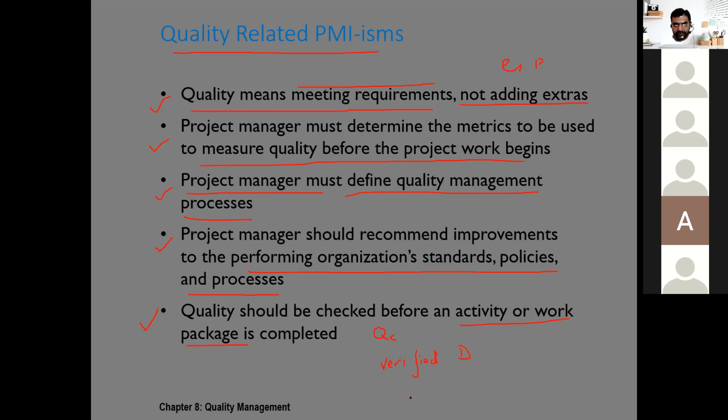Okay. And once deliverables are verified, we can go and show them to the customer for the sake of acceptance. And if those deliverables are accepted, then we call them accepted deliverables. So there is a difference between verified deliverables and accepted deliverables.